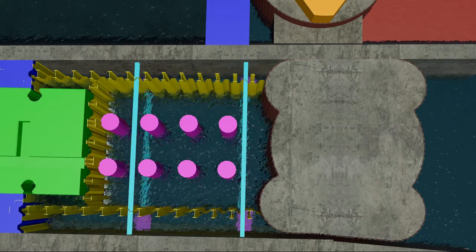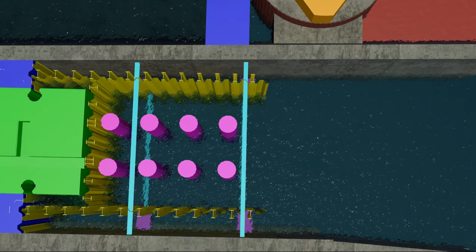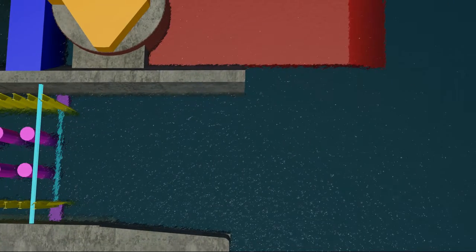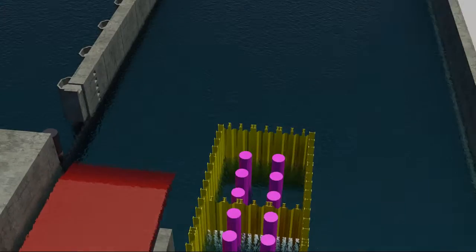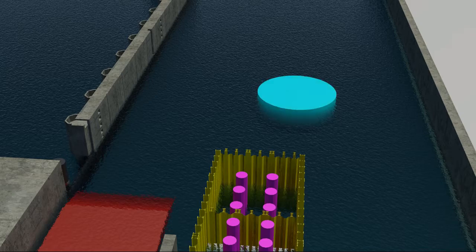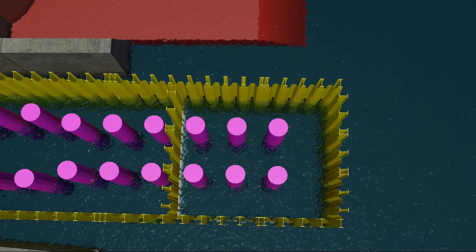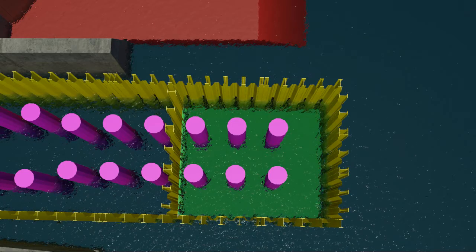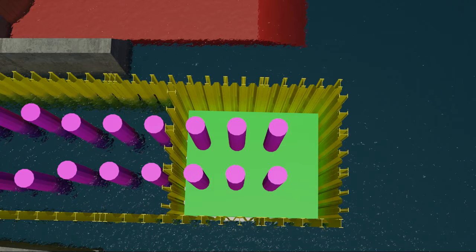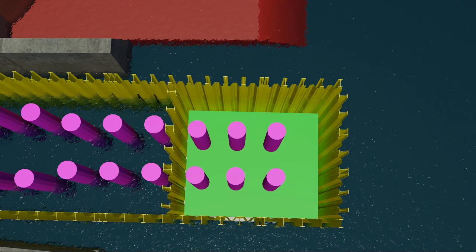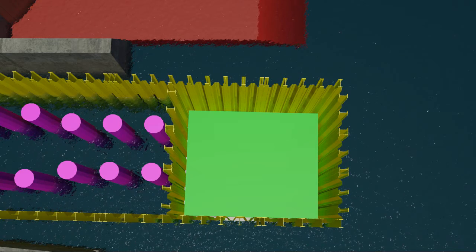Pump water down to lower pool elevation between the M22 closure and the closure cell and remove the existing closure cell. We then proceed to install the remaining coffer box and drilled shafts all the way to monolith M27 and install the downstream protection cell. We place tremmy concrete in M27 coffer box and dewater it. We remove the drilled shaft casings and place monolith wall M27.